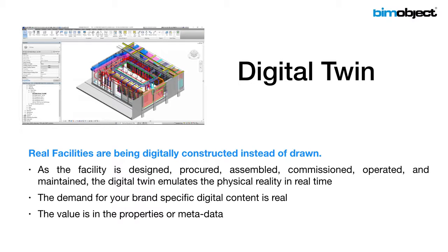I mentioned this a minute ago. That digital twin gets constructed up. It may start out as a single model on the designer's desk, but that model gets put into the cloud at some point and then gets embellished by all the actors involved. And it's done in real time. In the old days, we had clash detection meetings once a week, and everybody works 4 days a week trying to put their own systems together, and then they meet 1 day a week, and then they have to go back and rework another whole week because half the stuff they did doesn't work. That's not effective. We need to be able to do it with the various actors in real time.